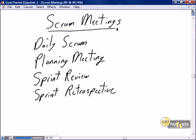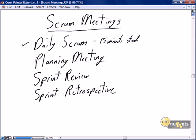This nugget is focused on the four scrum meetings that should take place in every scrum project. The most commonly discussed scrum meeting is the daily scrum. This is the 15-minute stand-up, a quick status review of how well the team is doing on the sprint.